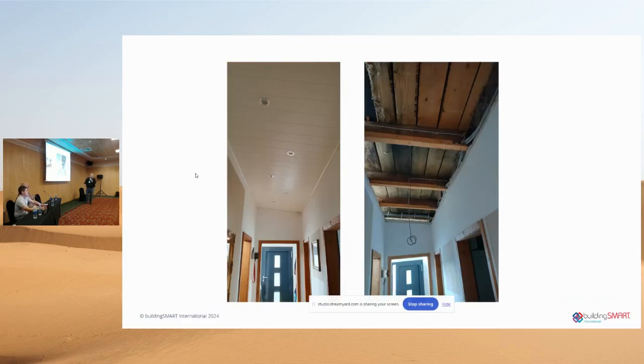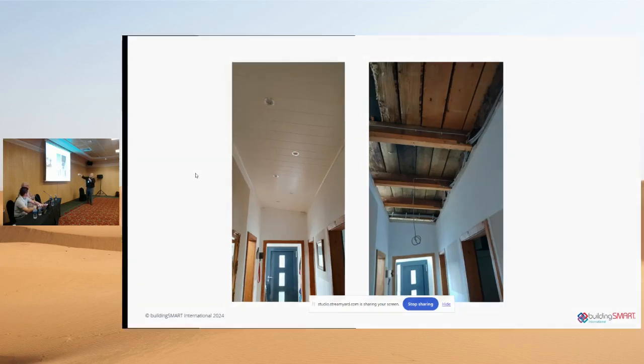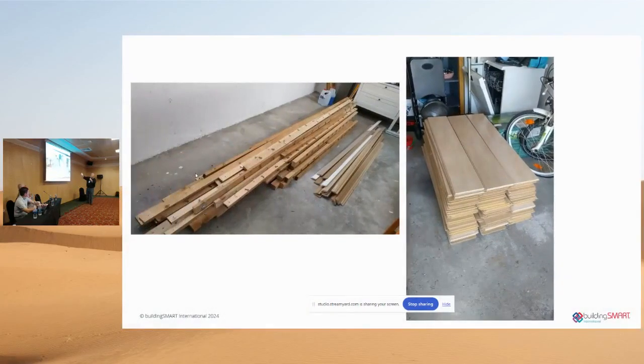So we've taken steps to remediate that. We've removed all the mold. We came in with the proper equipment because of the heads up that we had before. That's probably why Richard was having headaches. So we've taken all that out, and then we've stacked everything and taken all the reclaimed wood that we can, both from the supports for the ceiling and the ceiling itself, to be reused.